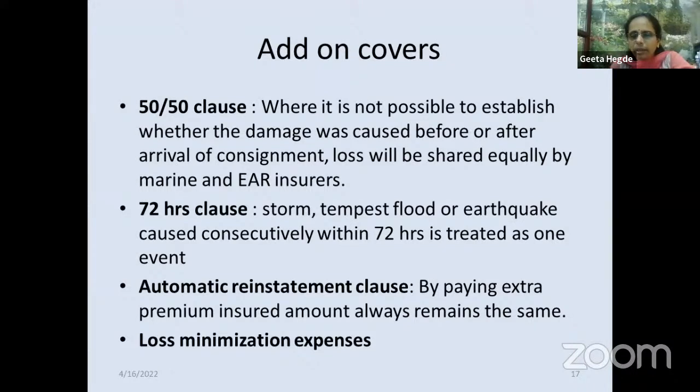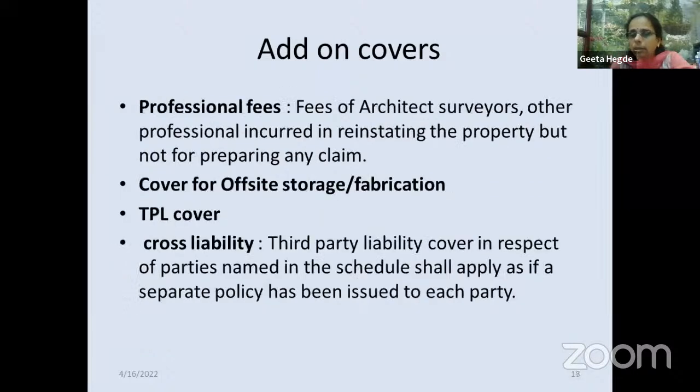Automatic reinstatement by paying some extra premium at the inception of the policy. The sum insured will always remain the same and no premium is to be charged or collected after the happening of the claim or after settling the claim. Loss minimization expenses. Professional fees, that is architect surveyor's fees. Cost of offsite storage or fabrication.